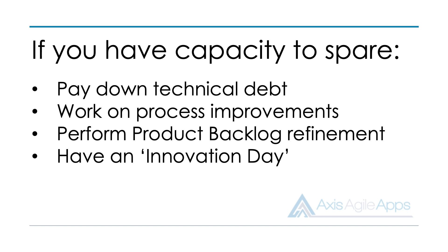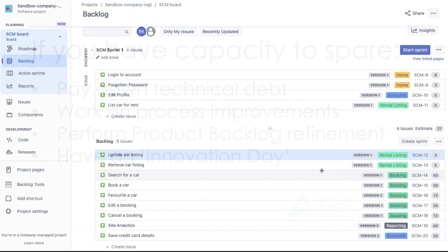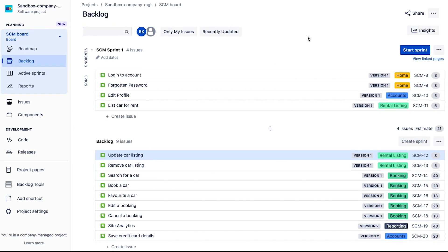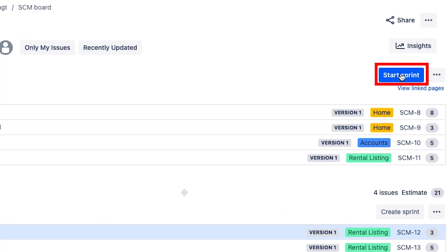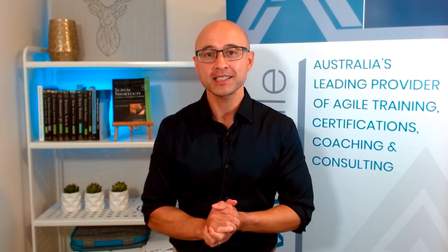At the end of the session, take a step back and perform a final review of the sprint plan, asking the team if they feel it's realistic and making sure they've considered the sequencing and whether the work can actually get done. Then you're ready — you can hit that start sprint button. So there you have it — that is how we conduct a sprint planning session using a team's velocity and their story point estimates.